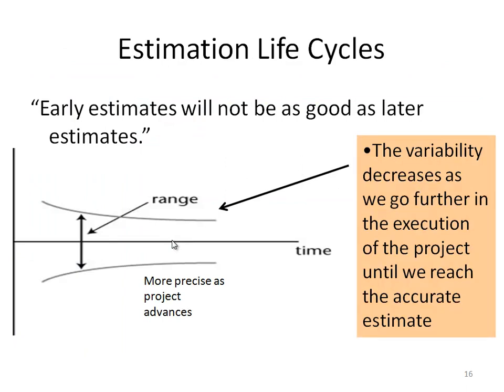When estimating duration, you start with a rough estimate with the intention to improve the precision of the estimates later in the project. Numbers are not 100% correct and could be changed, and the customer must be informed of the possibility of these changes. So we should state that in the kickoff meeting or in the first meeting with the customer, that those estimates are rough estimates and might change